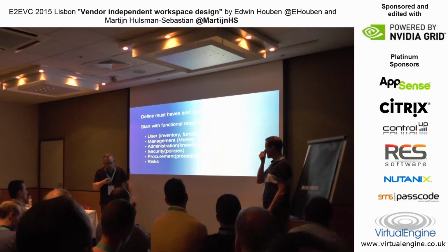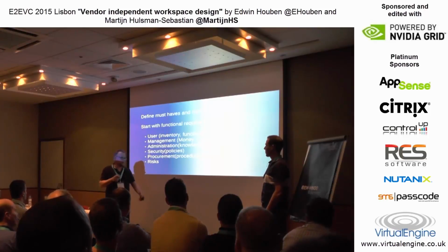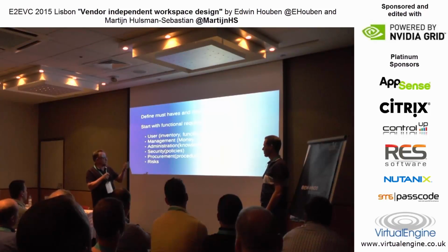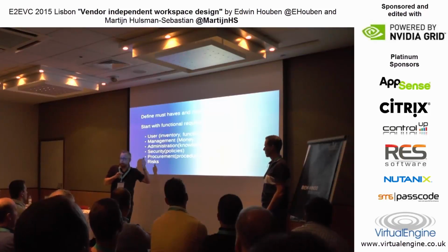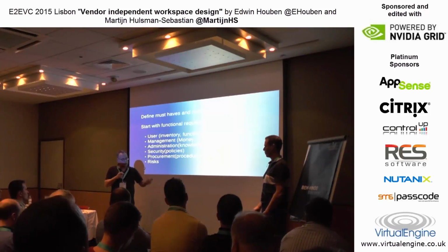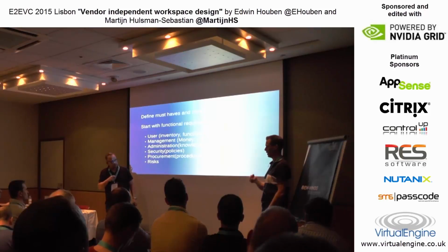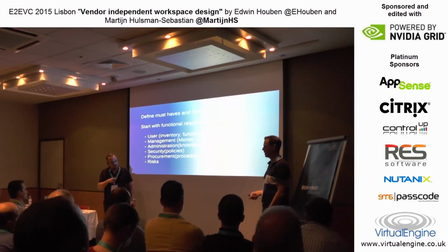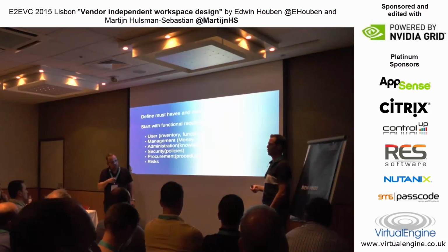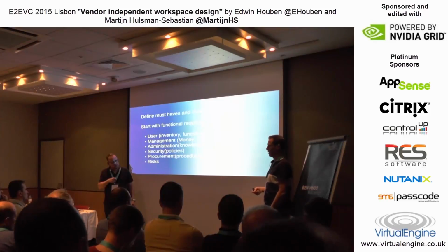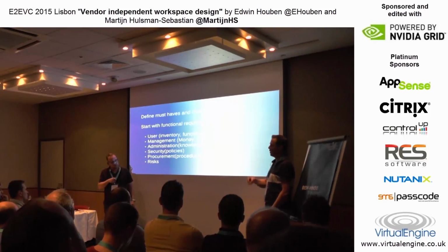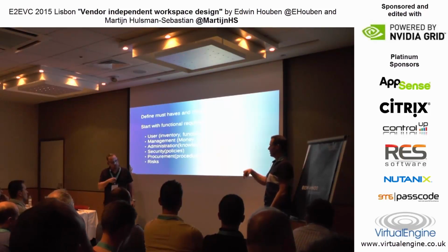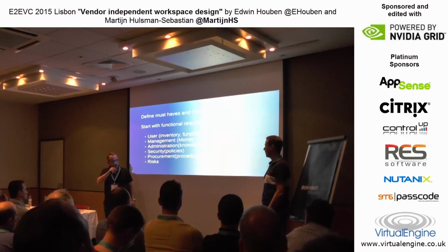And also management. If you start a project like this, one of our pitfalls was getting commitment from the higher manager. We asked for commitment. We got it when we had a project manager, and the project manager had to make a project start architecture, and then he got the commitment from management with a sum of money, although we said we need it up front. It took about 6 months.